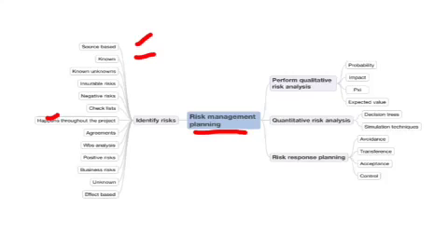Another version is based on whether it's a known risk or it's an unknown risk or known unknowns. A known risk means you know that okay, that risk is there. That is a known risk. A known unknown is maybe you are operating some part of the project which you are unable to execute, unable to estimate, and you are operating it through a control account or a provisional account. Then we say that okay, we know that we don't know about it. That is a known unknown.